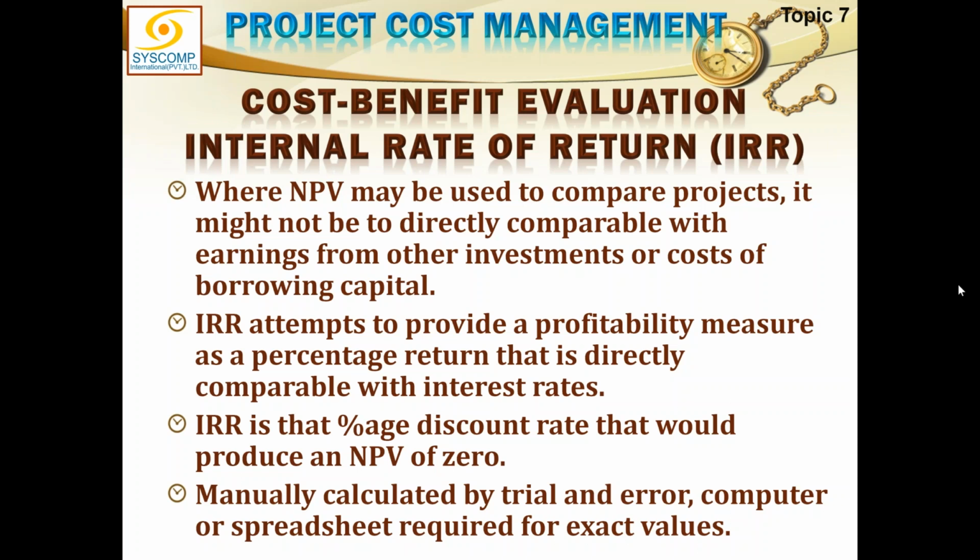Okay. If I'm not using the discount rate, I'm not saying that we can't use any rate. I'm not using the bank rate. I'm not dependent on State Bank of Pakistan. But the value for project one, you see, was very low, 618, right? At 10%, it was 618. What if I do some hit and trial and try to reduce the value of 10% to 9%? Do I get a better result? So my value will change. Naturally, if I change the percentage, 618 will either increase or decrease.